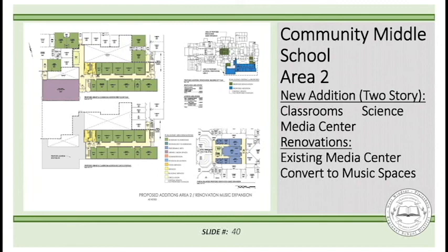And ultimately, as jobs get authorized, we'll do more specific presentations about the specific layouts. These are all conceptual design layouts. And I promise you that over time, if we go back and analyze these against what ultimately gets approved in two years or three years, you're going to say, well, there's slight tweaks. And that's because there's a process that we have to go through. And that's very typical, and that's completely normal. And this is part of the process.